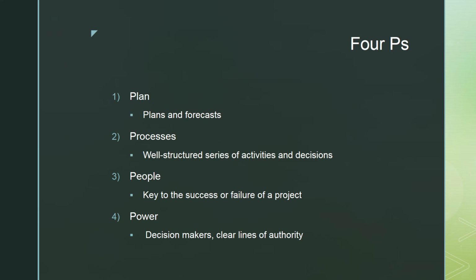Plans and focus are very important. You may focus certain delays that may occur. Probably you have heard that during the course of your project, there may be a strike in a sector which supplies a key component for your project. Then you build it in because you know if there is going to be a strike, that's what we are forecasting. So why not buy what we need to buy from that sector now so that we do not delay ourselves? Normally, we'd have bought it in week 4 or 5 of the project, but because there's going to be a strike in week 5, let's make sure we buy this by week 4, week 3.